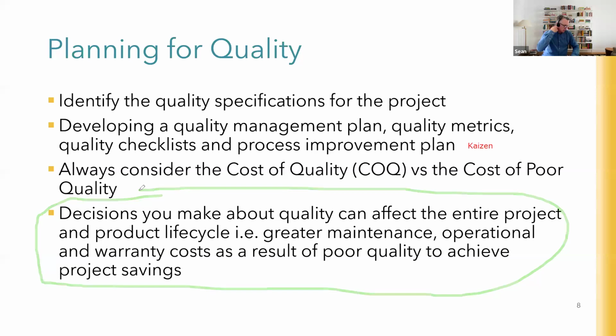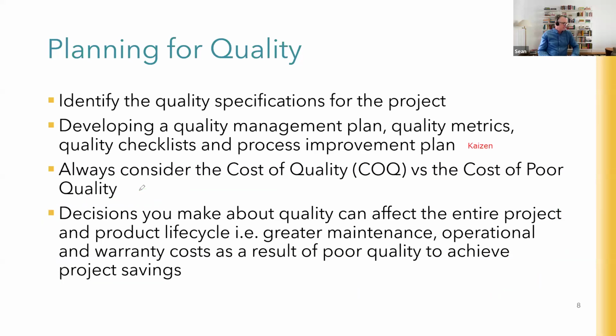I know on one project I worked on, we made an accidental mistake about this. It was for an urban restructuring project. I've mentioned it in other modules. It was 2.5 years, $20 million. It was to build a new pedestrian shopping mall. And we did not take into account that we'd built this beautiful new shopping mall, and the old pedestrian outdoor shopping mall was costing the local council somewhere around $30,000 a year for cleaning, $600 a week for a cleaning machine to run through it. What we'd done to it now required that to go up substantially. And we forgot to tell the asset people.